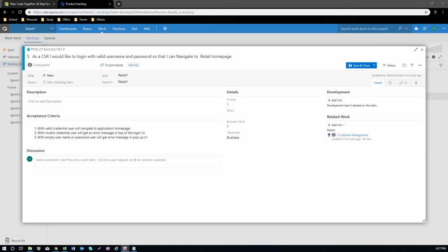So most of the time people vote for 1, 2, 3, and 5. More than 5 is still a very critical, very long story. A product owner always tries to resize it and make it smaller. So story point is missing. If you want to add any additional field in the list, or remove something, you can do it. You can customize everything in VSTS.